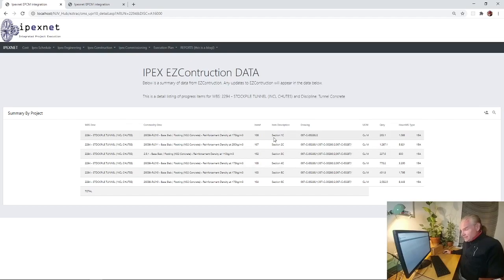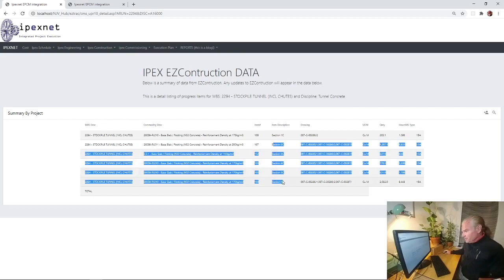Sometimes there might be one scope element that, because of some constructability issue, might not be done for 5 months, but the main scope that's driving, let's say, a handover to some steel installation might be these items. That's really important because in your schedule, you might have linked all these items to the same Primavera ID and it won't finish. So you won't have a good handover interface between an activity finishing and an activity starting.